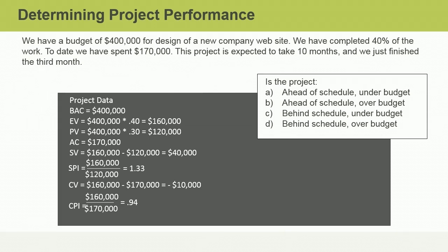If you suggested that you may explore resource leveling or smoothing to possibly lengthen or even delay some activities, you are correct. This would allow you to slow or postpone some of your spending and possibly get the budget back on track. The third of the triple constraints is scope, but it might be too extreme to start cutting product features and requirements when your budget is only a bit off. In summary, you can take raw work performance data and turn it into useful work performance information. Then you can make sound decisions that put the project back on track.